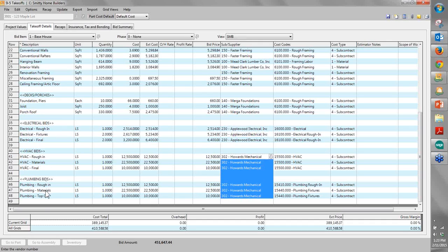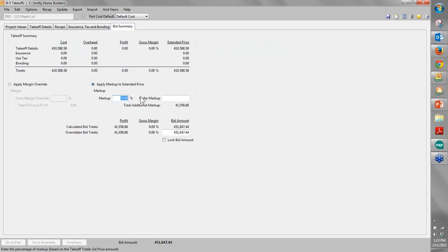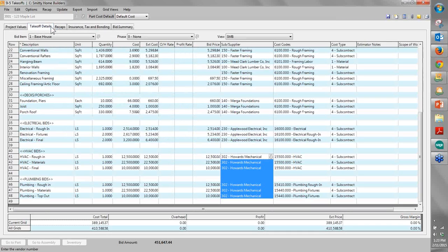So just like you're doing in Excel now where you're putting all the bids in, you're marking them up, putting sort of a markup on it, I'm dropping all that together. I get to my bid at the very end. Maybe I'm doing a very simple 10% markup. I could be doing an overhead plus a markup depending on what level of difficulty I want to do, or what level of detail I want to go into. But let's go back over to the detail for a second.